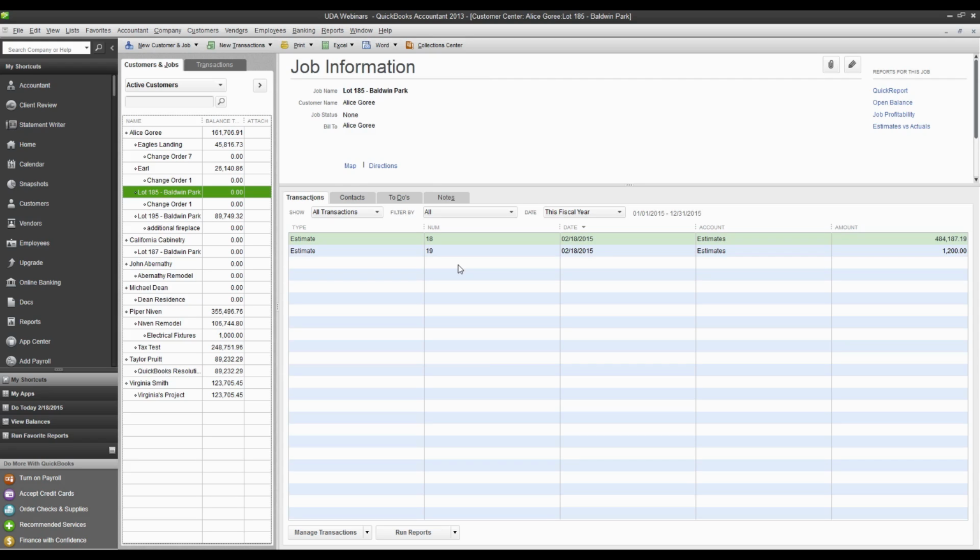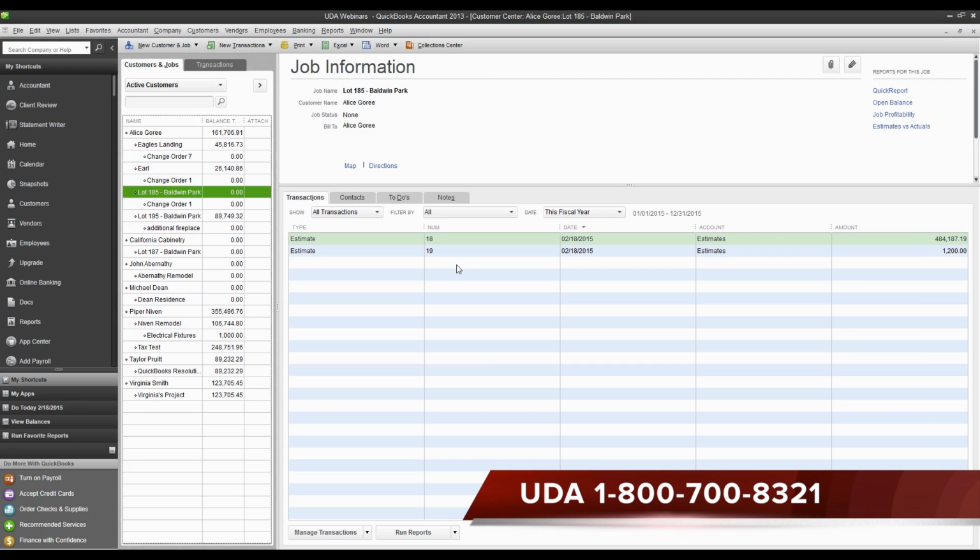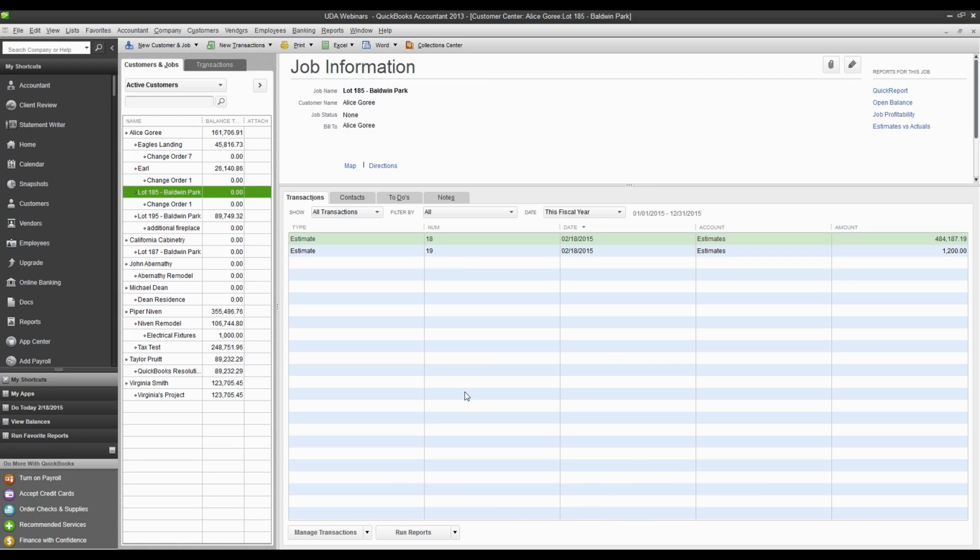So we have a scheduled value that we can put together, which is G703, the schedule of values. It's going to fill in column B, I believe. But this doesn't help us actually apply for payment. And in order to apply for payment, we have to set up invoices in QuickBooks as well.